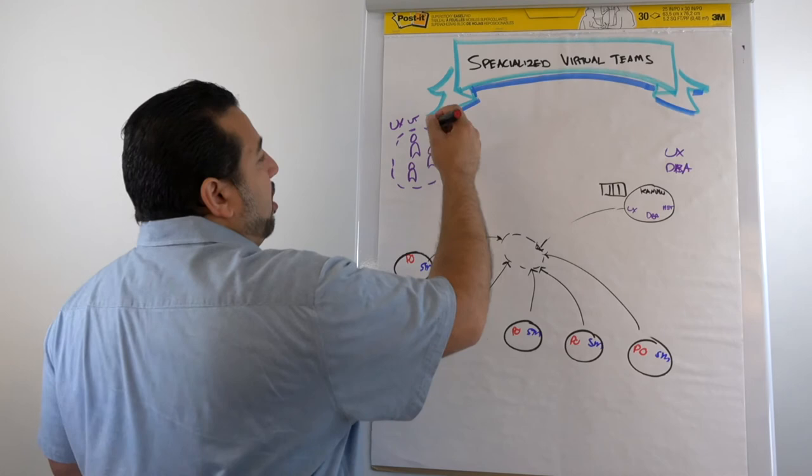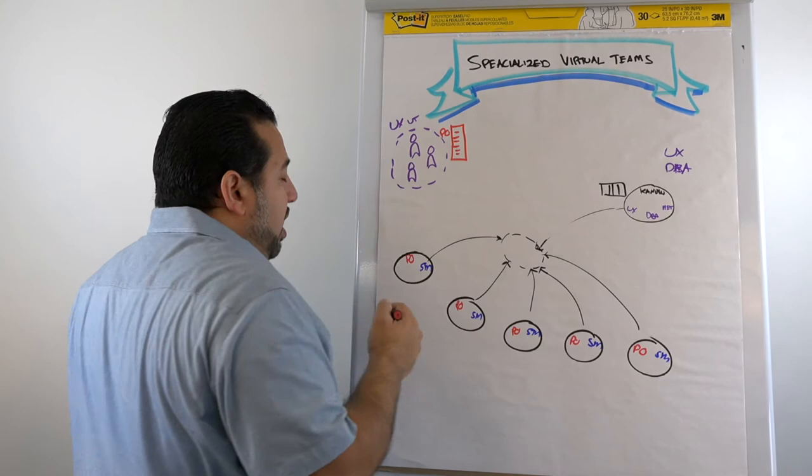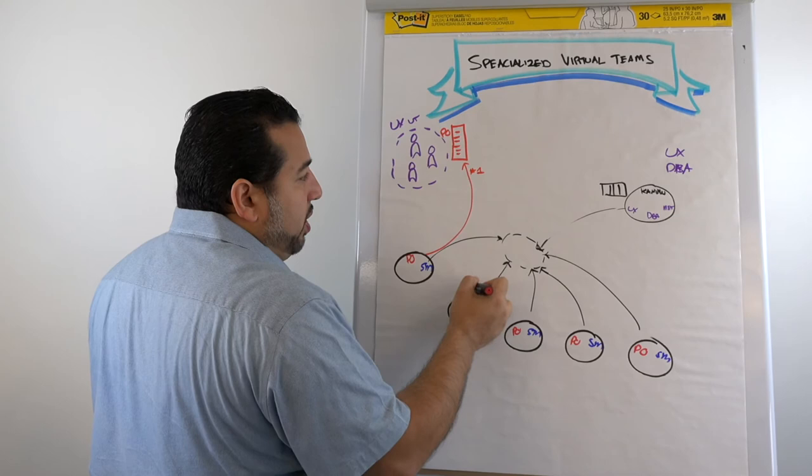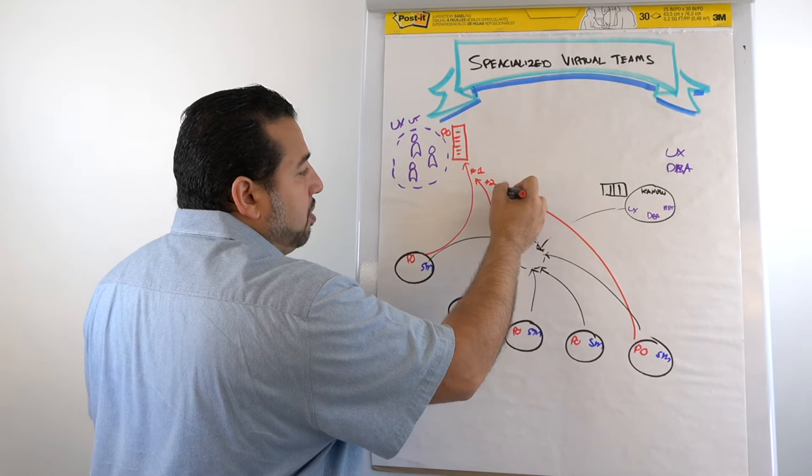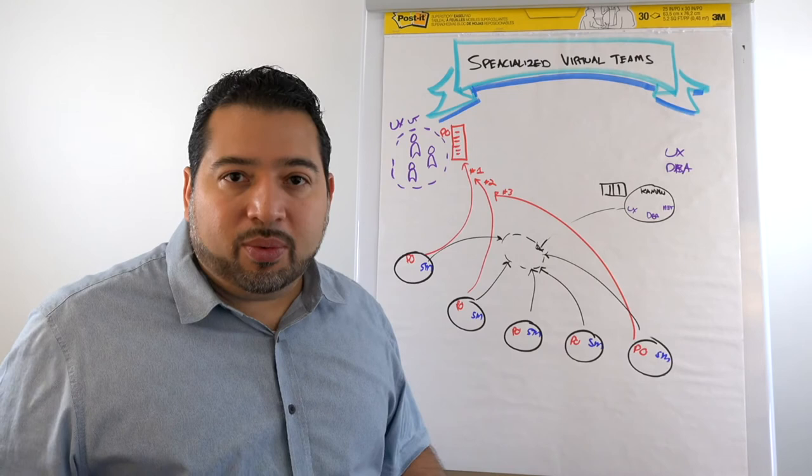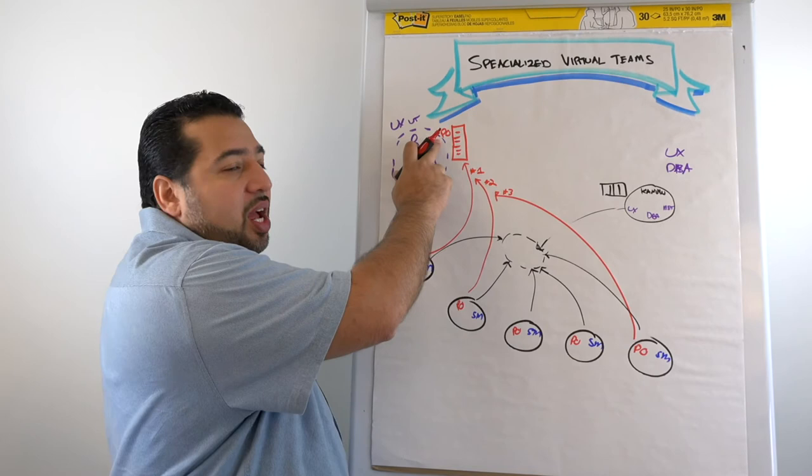But what they have is a product owner, some type of product owner, or some person that prioritizes the work. And so how this works is that each team or product owners would request into the virtual team: hey, UX team, we need help with this. So request number one, and we need help with this request number two. And there's some type of agreement on the virtual team. This is what you need to make it work is that when you submit a request, we'll respond within 24 or 48 hours to let you know where you are in the priority. We'll let you know where you are on the priority.